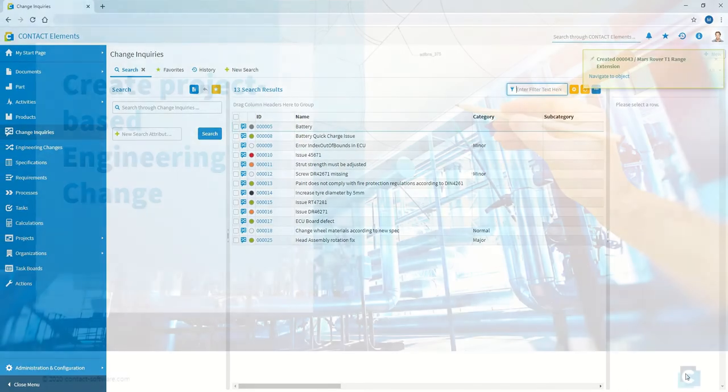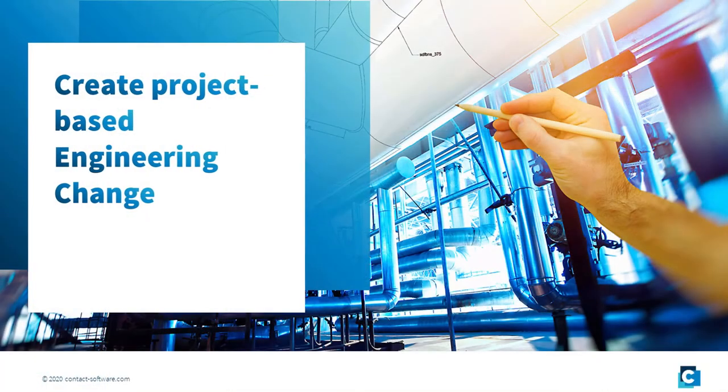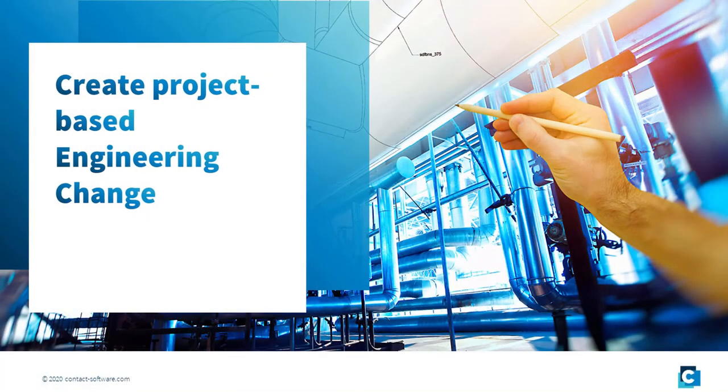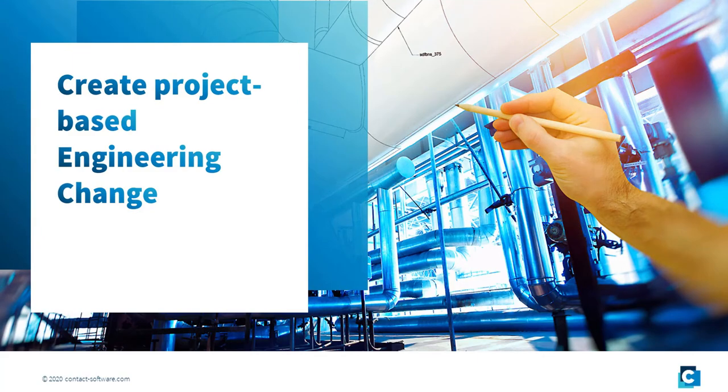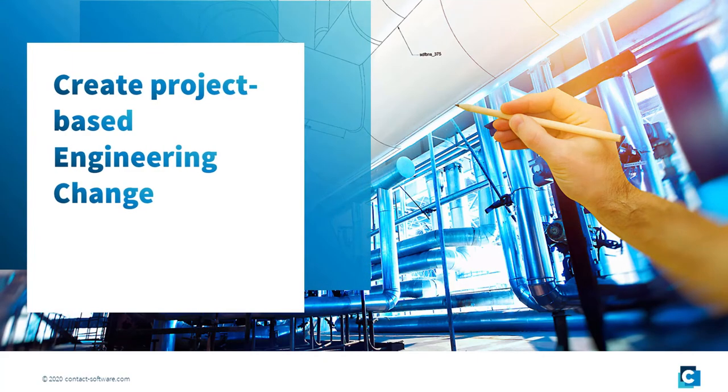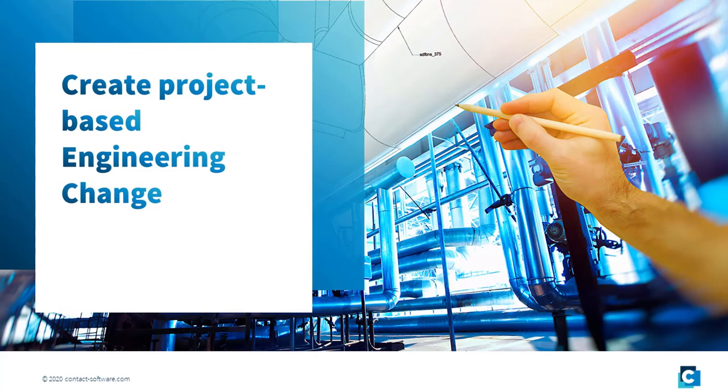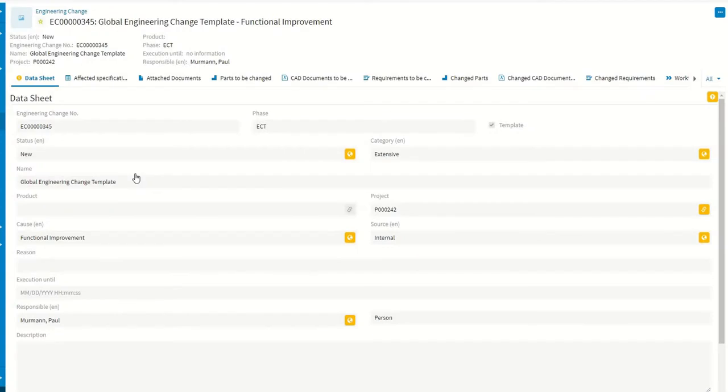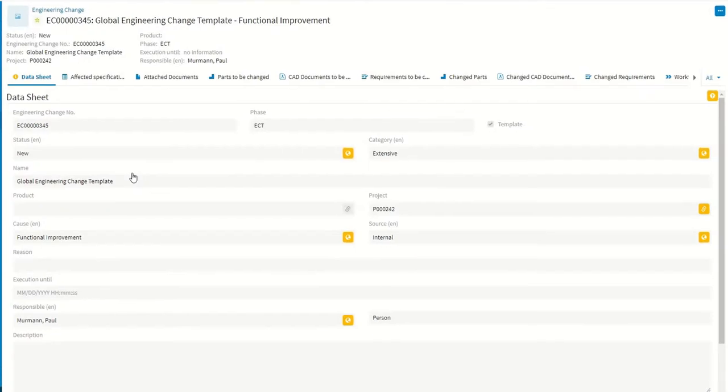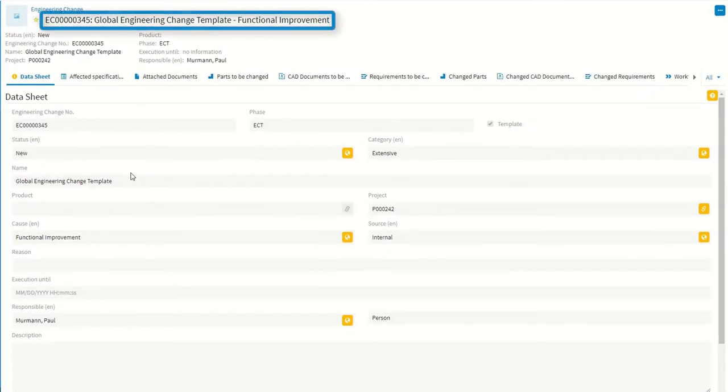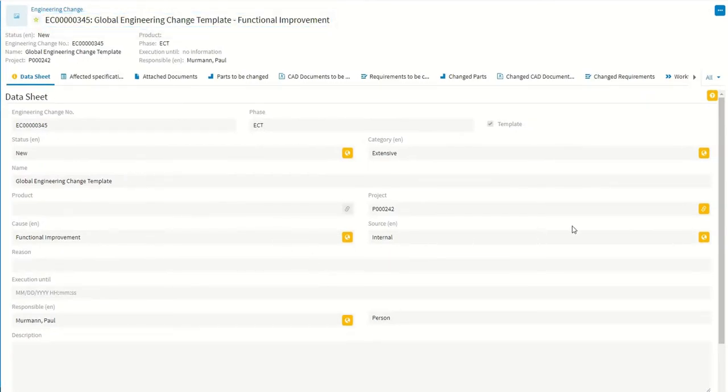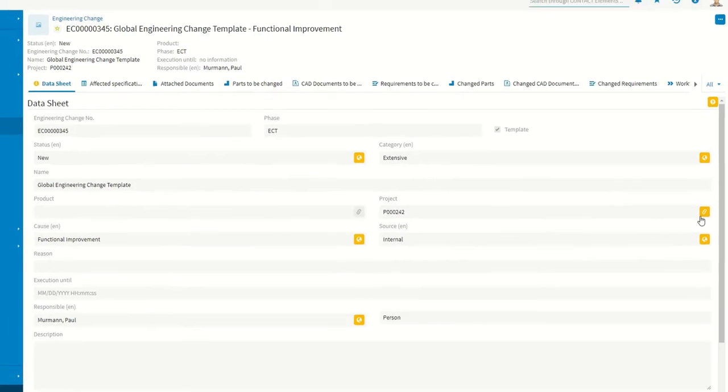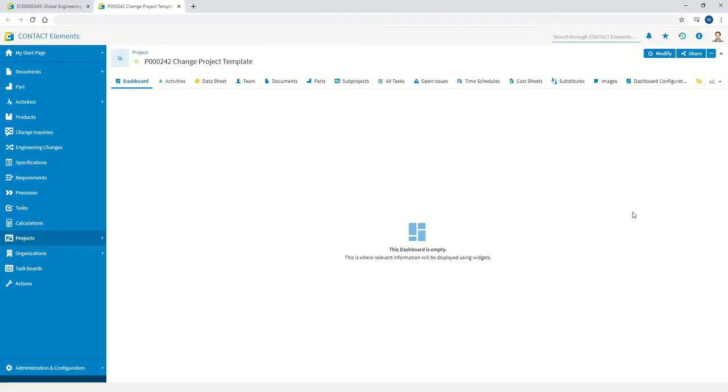Those responsible for the processes regularly review the change inquiries received and create new change projects as required. These build on ready-made templates that can, for example, include predefined process steps, schedules, tasks, and roles.